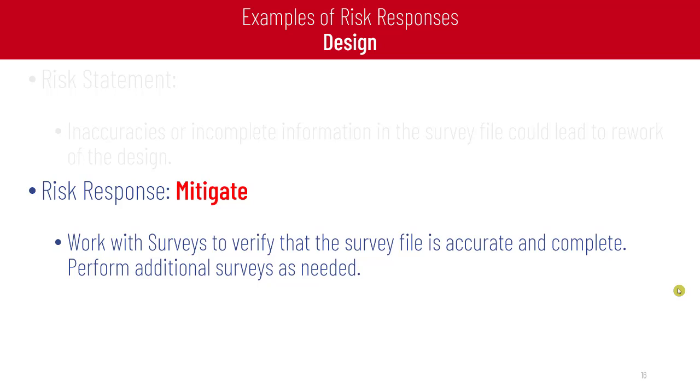Work with the surveyors to verify that the survey file is accurate and complete. Perform additional survey as needed. Once we perform additional survey, we can mitigate, we can reduce the probability or impact of the risk once it occurs.